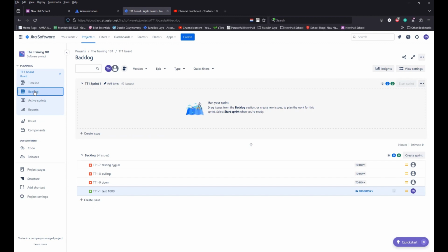So when you go to the backlog for your Scrum project, you would have the list of all the items that you're planning to prioritize within your teams when you're having your Scrum meetings, and then the items are going to be prioritized, and then you move them into the sprint. In most organizations, they do 2 weeks iteration. Some would do 3, completely up to the company or how your team is set up. In this training, I'm going to be doing a 2 weeks iteration.